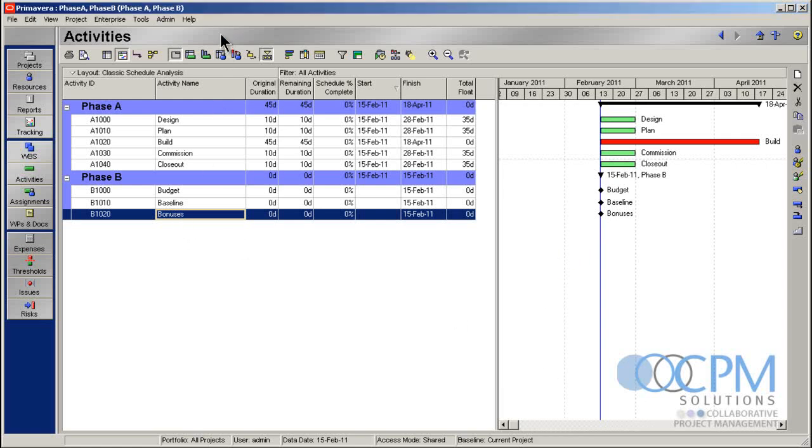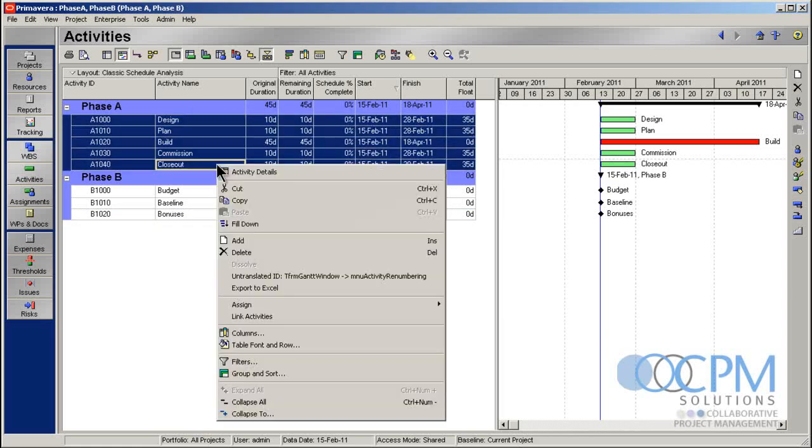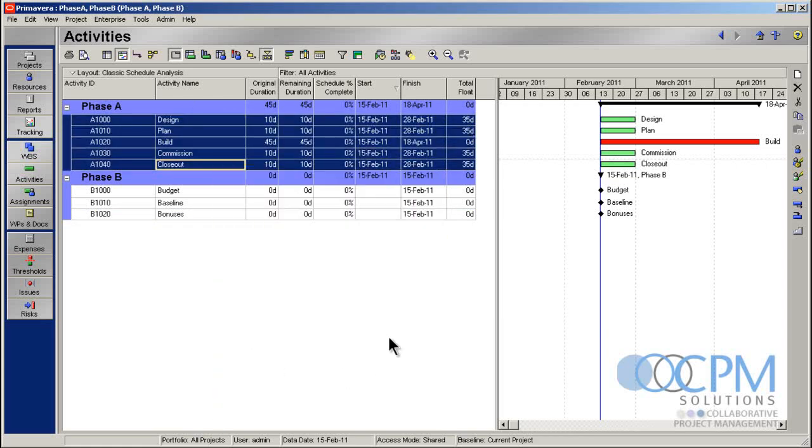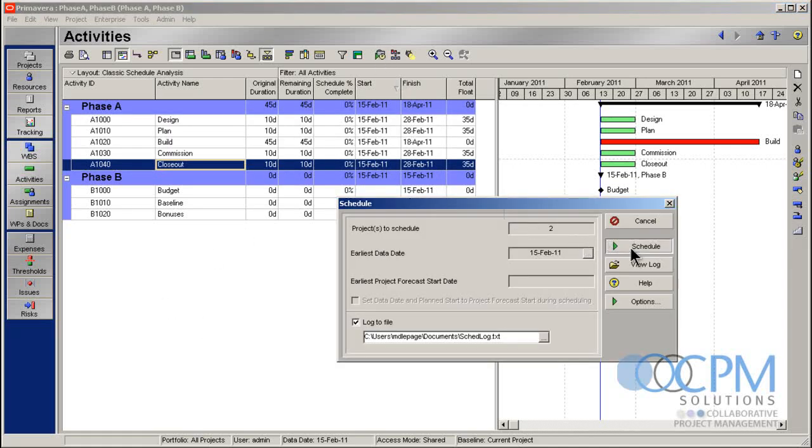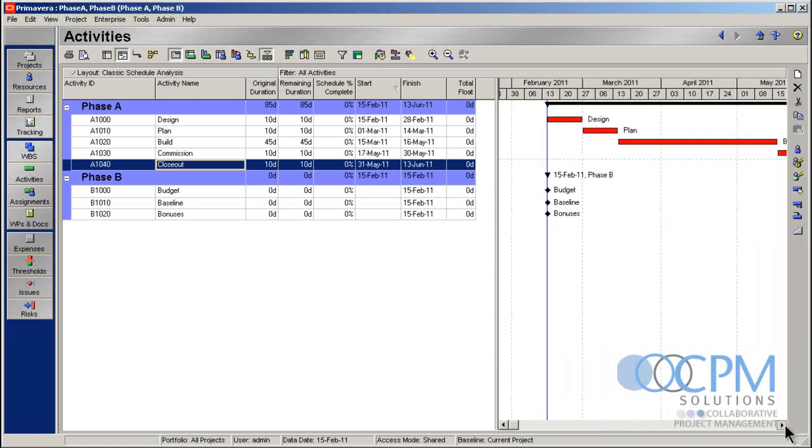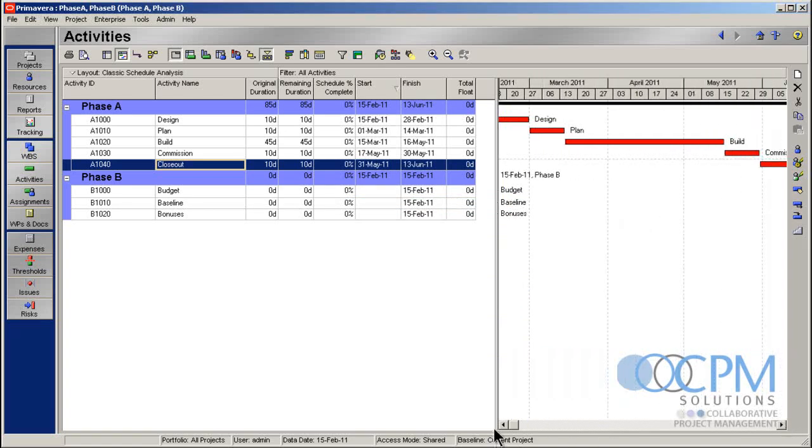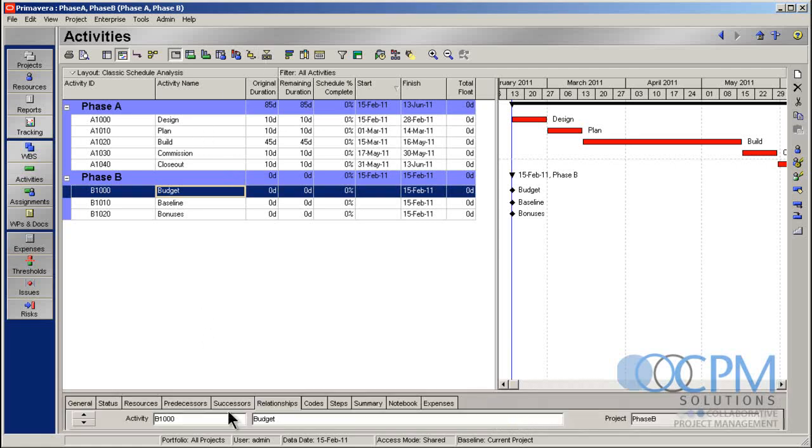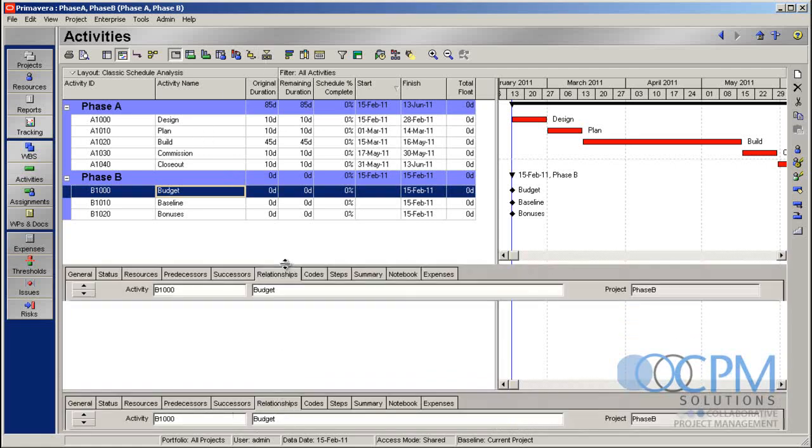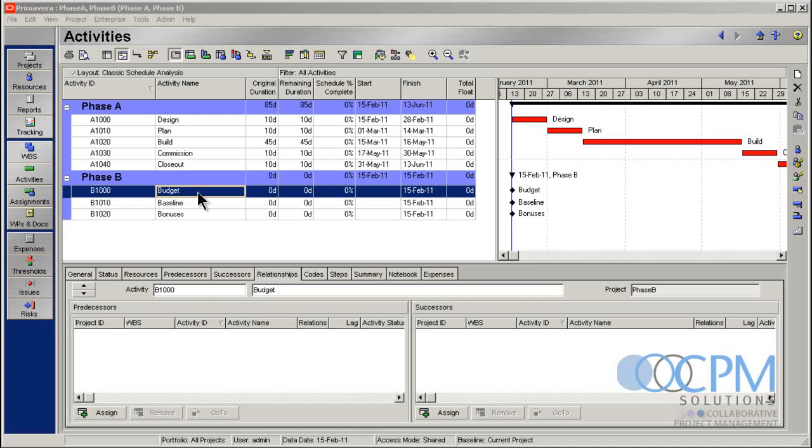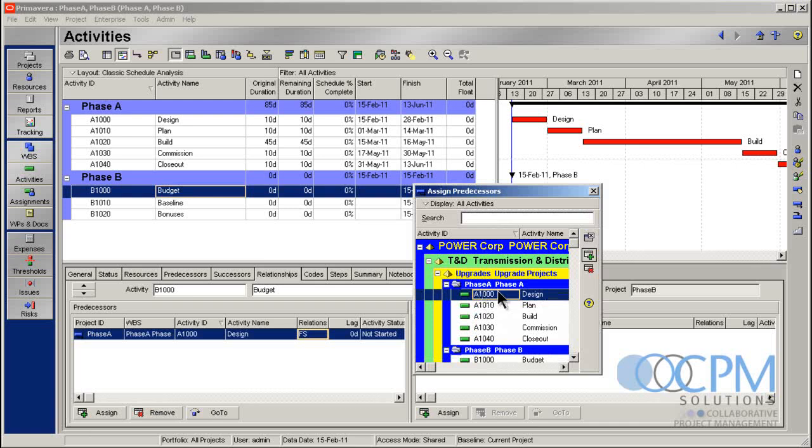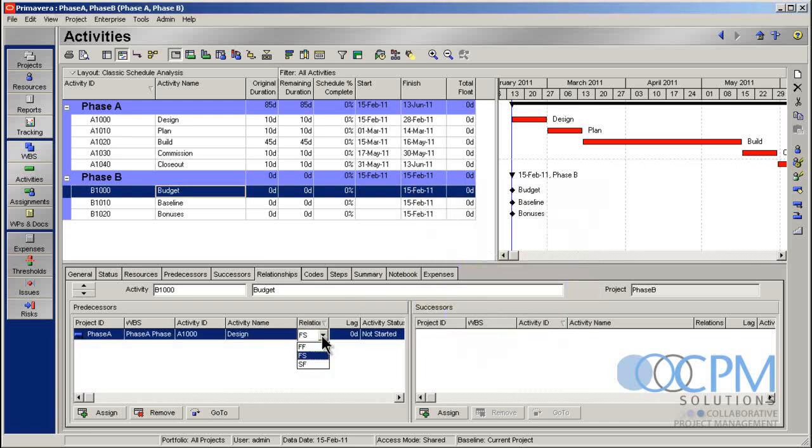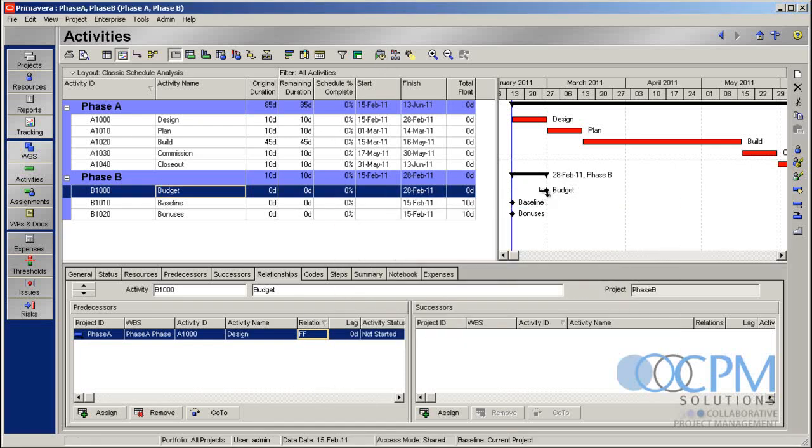Okay, so let's start by getting some things linked up here. I'm going to go ahead and select all these activities. I'm going to right click, go on down to link activities. I'm then going to go ahead and schedule this project. Let's see what happens when I expand things out. Boom. I've got an expanded Gantt chart. There we go. So things are linking up already. Now, next step then is to link these milestones up down here in place. So I'm going to bring up the bottom half of my screen here, make a little bit of room. These milestones down here, I'd like them to link up with phase A. So I'm going to interlink these two projects. My budget milestone, I'd like to occur as soon as my design is done. So once I'm done my design, I should have a budget in place as well. So what I'll do is I will assign a predecessor of design and I will make it a finish-to-finish relationship. Go ahead and we'll schedule that and boom, that puts my budget milestone where I want it.